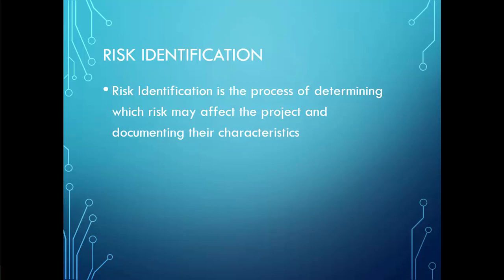It is recommended to focus on risk events rather than risk consequences. For example, an instrument does not return correct data, which is a consequence of events like poor circuit design, an incorrect or failed component, or poor software implementation.